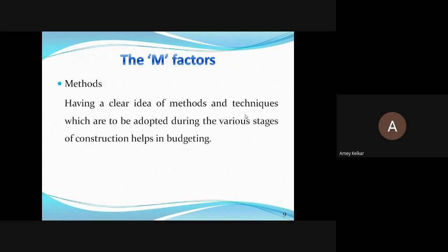Now, what happens here is we have various methods by which work can be done. For example, take simple excavation work. We can do it manually or we can use machinery. It depends on the scale of the work, one thing; how much urgency you have, the second thing; and availability of the resources, the third thing.